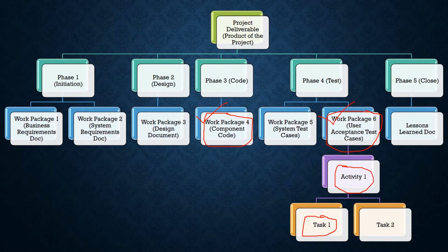So this is the 8/80 rule, which means 80 hours is typically 10 working days. So it is the same as the 10-day rule.